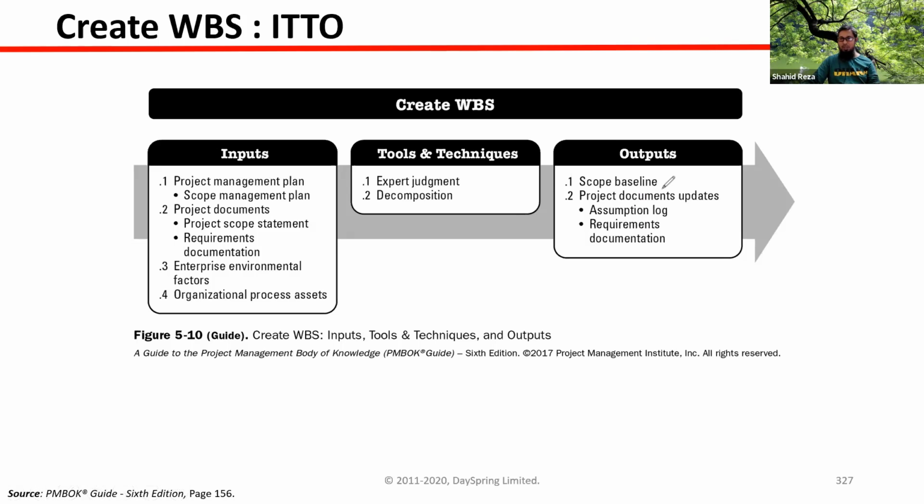Scope baseline actually consists of three things: one is the WBS, another one is the WBS dictionary, and the first one was the scope statement. These three documents